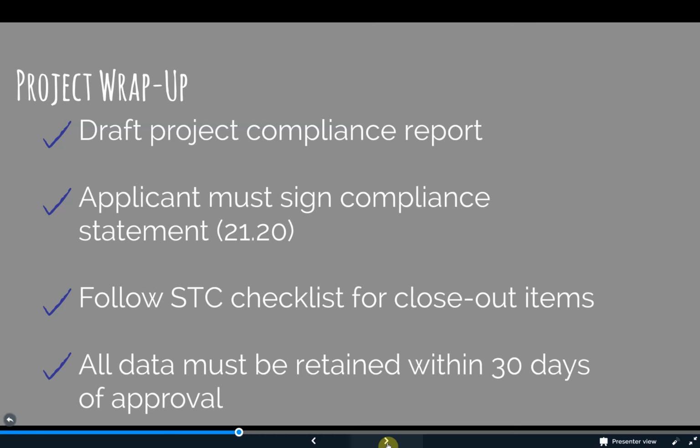Another benefit of this summary report is in a non-concurrent validation project. It serves as a useful tool for a foreign CAA to learn what FAA concerns surfaced during the project. A template exists for this report and is created by exporting a lot of information from the project's compliance database and the conformity database.